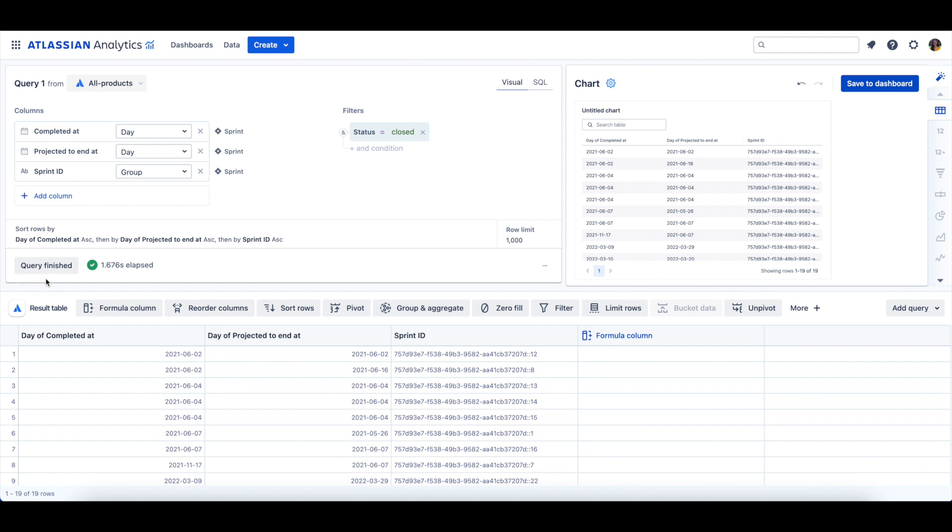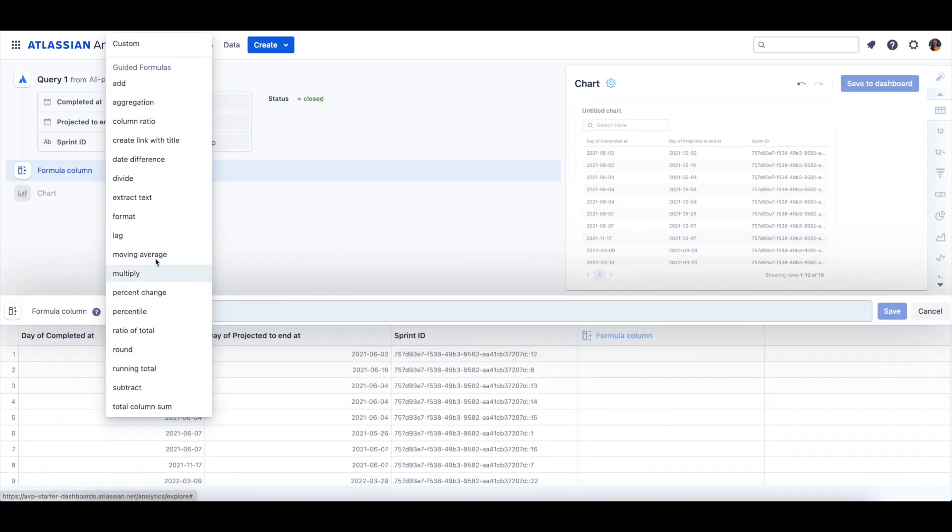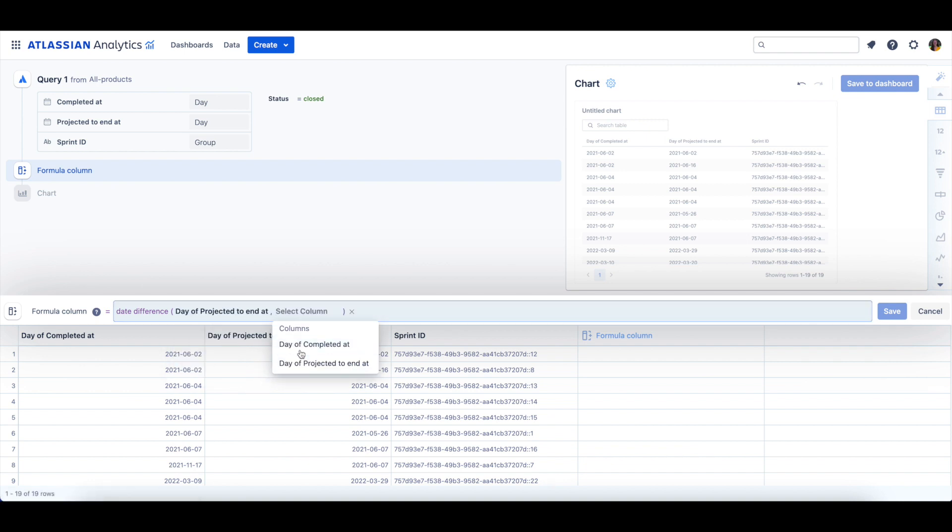To do this, we can add a formula column and select the Date Difference Guided formula. We'll then select the Day of Projected To End At column, and then we'll select the Day of Completed At column.